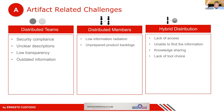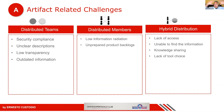Release planning is: here's our velocity, here's our set of team of teams and what they are delivering on a periodic basis, and understanding the effort involved in the rest of the work. We know we can get a certain amount of work done in a month, and that's going to be our release — this is what we're going to include in our next month's release. So one is about planning and divvying up the work — that's program increment or program planning or big room planning — and the other is about determining how to utilize that in a release frequency.